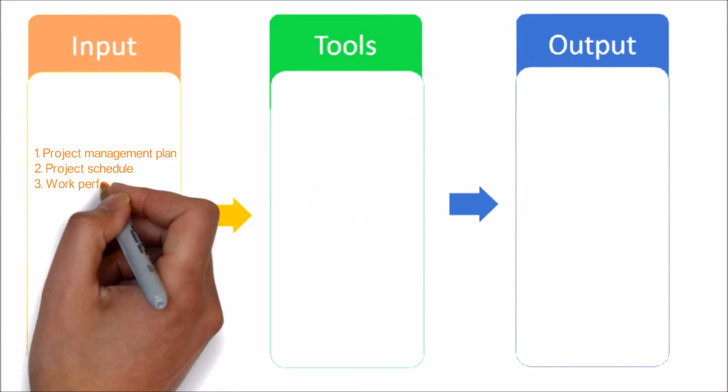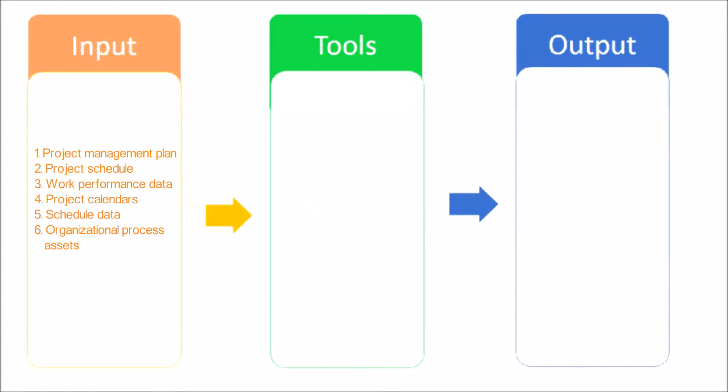Here are the inputs. Project Management Plan: The Project Management Plan contains the Schedule Management Plan and the Schedule Baseline. Project Schedule: The Project Schedule refers to the most recent version with notations to indicate updates, completed activities, and started activities as of the indicated date-to-date.